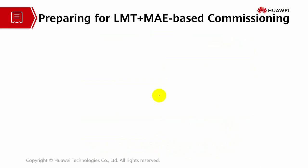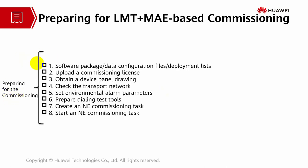Let's look at how to prepare for LMT and MAE-based commissioning. The preparation steps are: first, prepare the software package, data configuration files, and deployment list; upload the license; obtain the drawing; check the transport network; set the environmental alarm parameters; prepare the dialing test tools; create the commissioning task; and start the commissioning task.